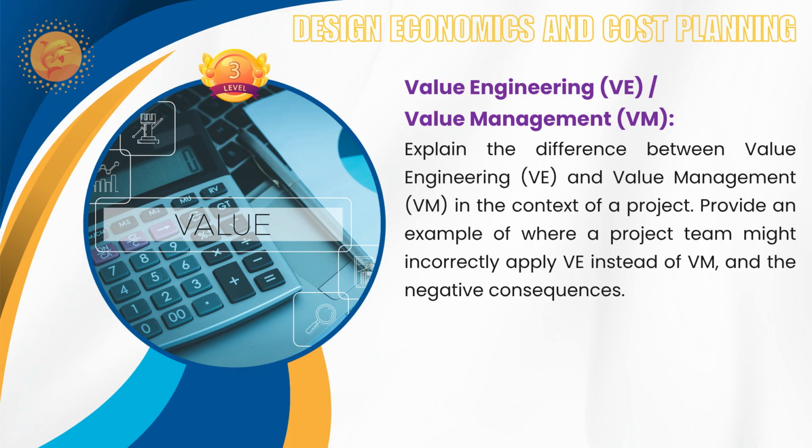So the right time is always somewhere like, as a commercial manager with the employer, main consultant or supervising consultant, before the tendering process or during the tendering process. You can do some value engineering exercise or ask the bidders to submit alternative solutions that will come into the picture without any contractual obligations.